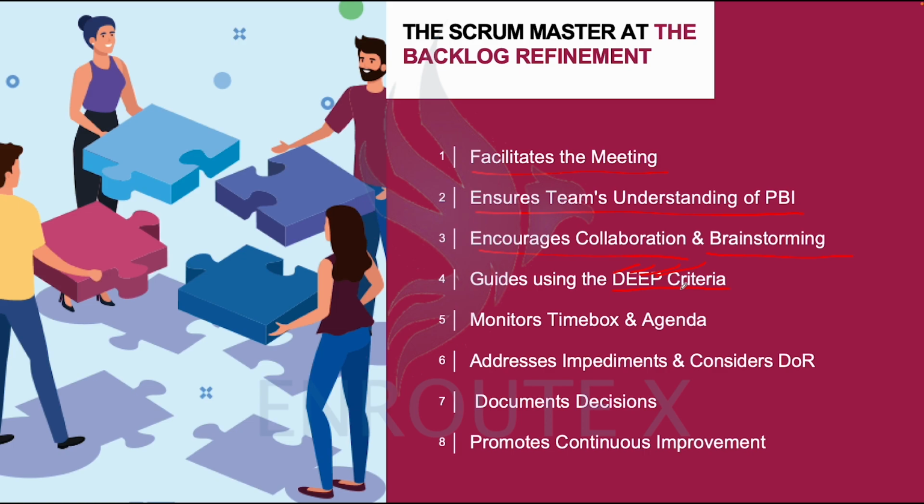So you are ensuring each of those stories we are preparing has the details needed. All the details, it's actually detailed appropriately. You are ensuring that the story is flexible and adaptive enough. It's emergent. You are ensuring that each story has an estimation. So we would see that at the backlog refinement meeting, which you would go through in your practicals also, you could make use of tools like planning poker. The same planning poker we use for sprint planning.